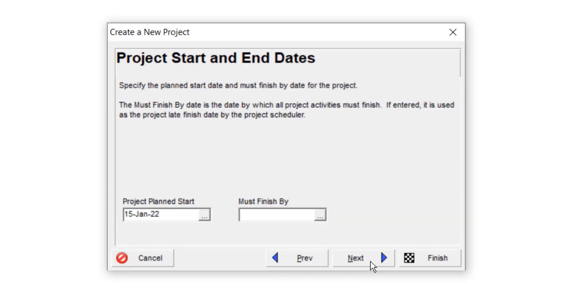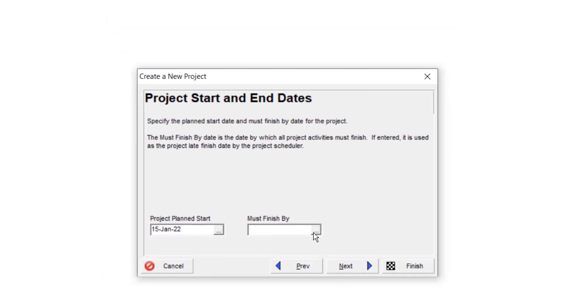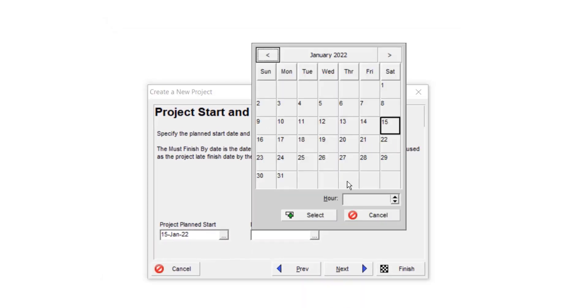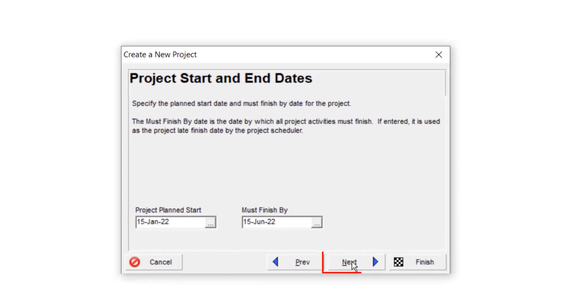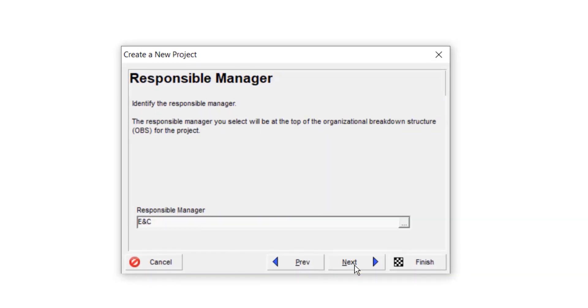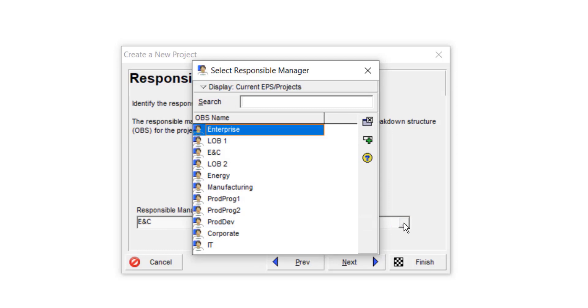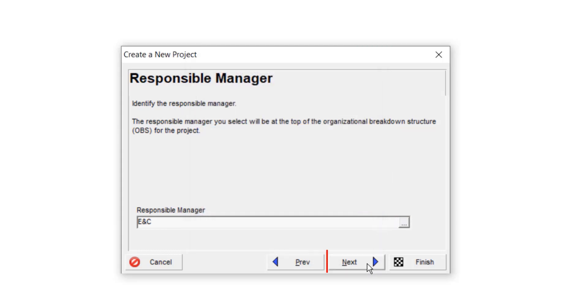Select next. Select a project planned starting date and a finishing date. Click on select. Select next. As the responsible manager for your project will be engineering and construction management, so leave it as E and C. Otherwise, you can change it by clicking here.